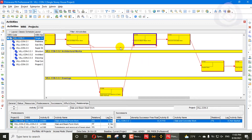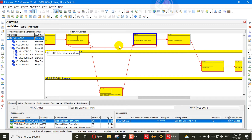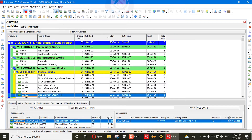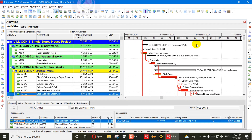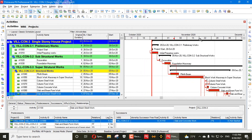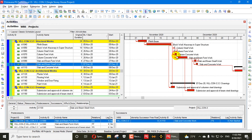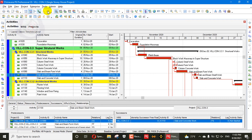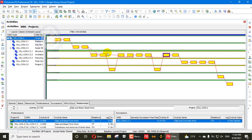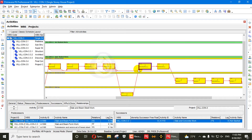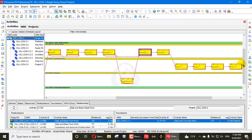This is a redundant relationship. I'll go down and try to see it more clearly. This relationship is redundant — this logic in the network causes unnecessary computation and confusion and congestion in the network diagram, as you can see here. Also in the schedule you can see a lot of lines, and when you go to the network diagram you can see it clearly from here.